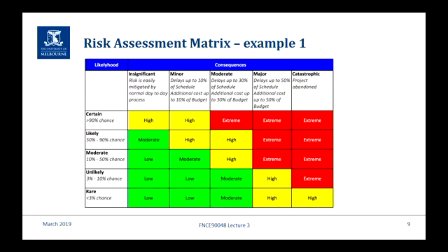Now, I'm not saying that every project does one of these traffic light type diagrams. It's probably a little simplistic in a sense, but you do need to be able to represent the results of your risk analysis one way or another. So this is as good as any. But the key elements here are that there are two characteristics of the risk that need to be assessed. How likely is the risk event to happen? And if it does happen, what are the consequences? And it's usually the financial consequences of the economic loss. That's reduced revenues or increased costs or loss of assets.